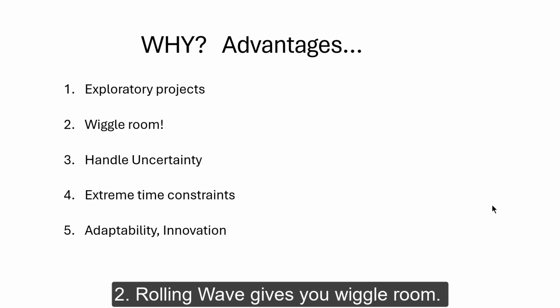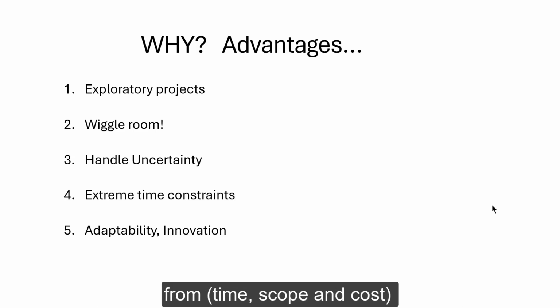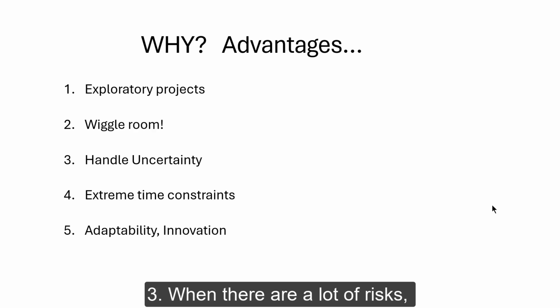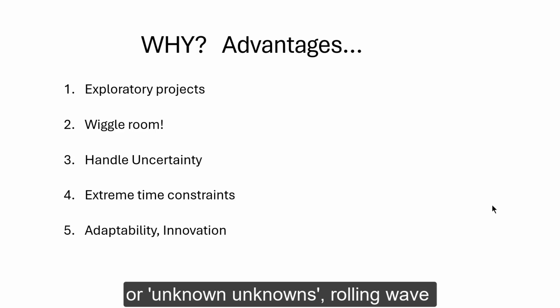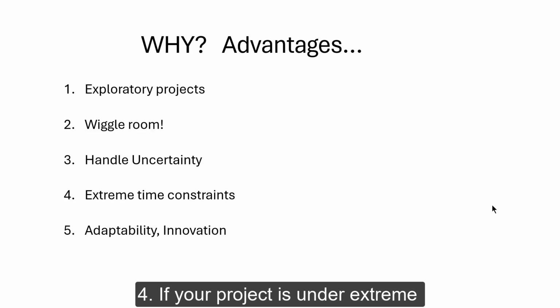Second advantage, rolling wave gives you some wiggle room. That is, it gives you some ability to recover from time, scope and cost decisions that you have to make and you are not 100% sure of. Third, when there are a lot of risks or unknown unknowns, rolling wave enables you to handle uncertainties a lot better. Fourth advantage is, if your project is under extreme time constraints, then using rolling wave enables you to start